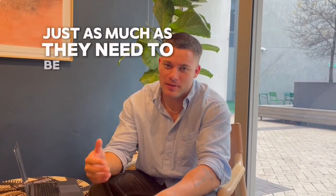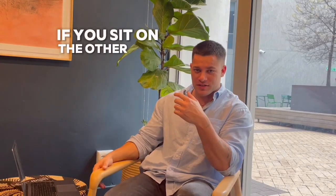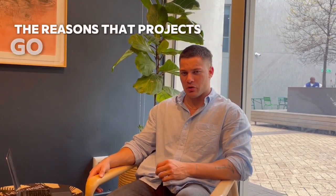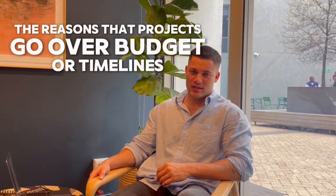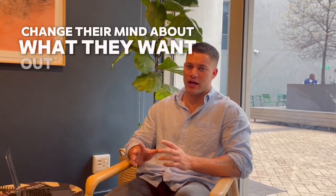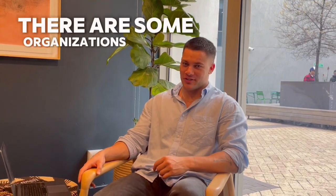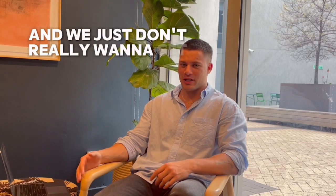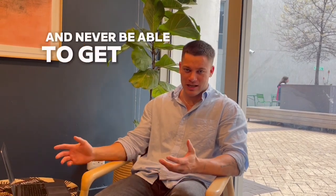As a client, you need to listen really carefully and actually have trust in your partner. You need to be a good client just as much as they need to be a good partner. If you sit on the other side of the fence, you see that 90% of the time, the reasons that projects go over budget or timelines is that clients continuously change their mind about what they want out of their project. There are some organizations which we will never work with, as they are just too big and too chaotic, and we just don't really want to get drawn into their world and never be able to get out.